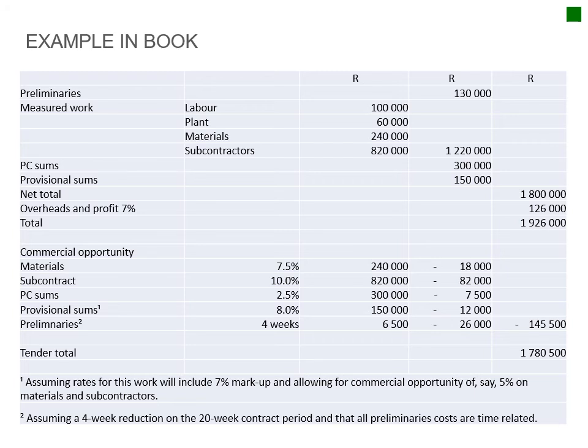design or basic project where you have your general preliminaries that you priced, you have your labor, your plant, materials, your subcontractor cost, you have your PC sums, your prime cost sums. Hopefully you guys know what that is. And then you have your provisional sums, and then you have your profit and overheads onto that.